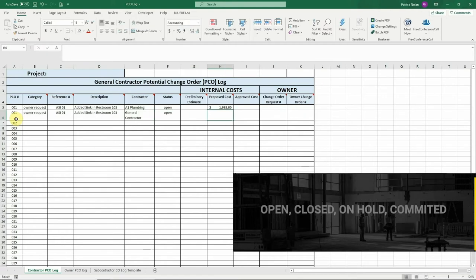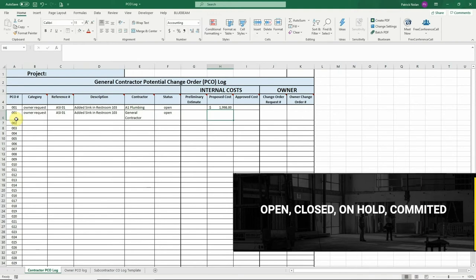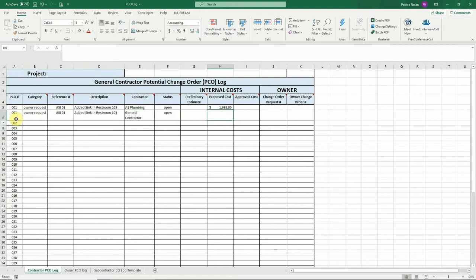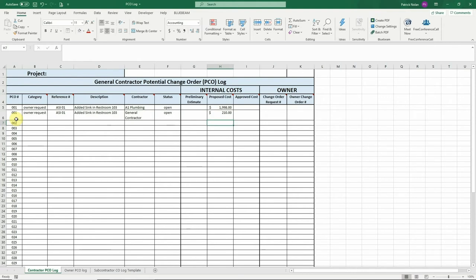The status is typically set to open, closed, on hold, or committed. Committed means that the change order has been issued. The internal cost section of the log is where you'll track the costs received by your subcontractors and any other costs your company incurs related to the PCO. Enter the cost information once you receive it, updating as you go through the PCO process.